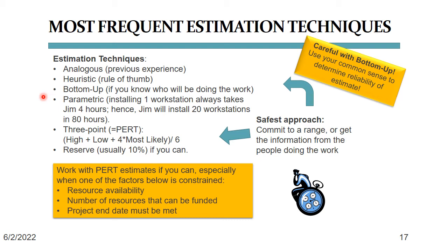And lastly, there's Pert Estimating, which, if bottom-up estimating cannot be done because there isn't enough time to wait for people to do their own math and get back to you within 2 or 3 business days, that is the best choice. Pert stands for Program Evaluation Review Technique. It is an estimating technique that uses a weighted average of 3 numbers to come up with a final estimate.